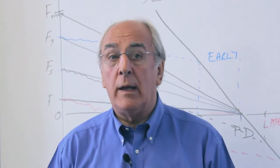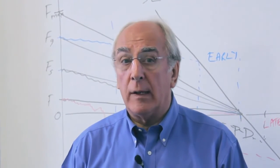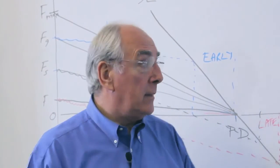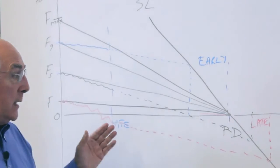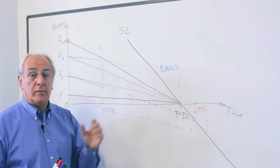So that technique, pretty simple, pretty effective, and it's devastating. It's relentless in the way it monitors, translates the monitoring of the progress into a trend on float against this sensitivity line here, which indicates whether or not we're going to be late or early in various parts of the project.